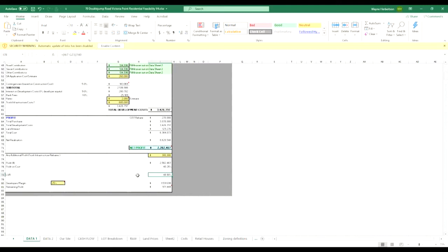Okay, so developer's margin is 1.5. Sometimes I do this. So normally developers want 25% margins. You know, that's their normal working thing. And so what we're saying here is, if you went with the normal 25% margin, you'd have 1.5 million, which is your 25% margin.